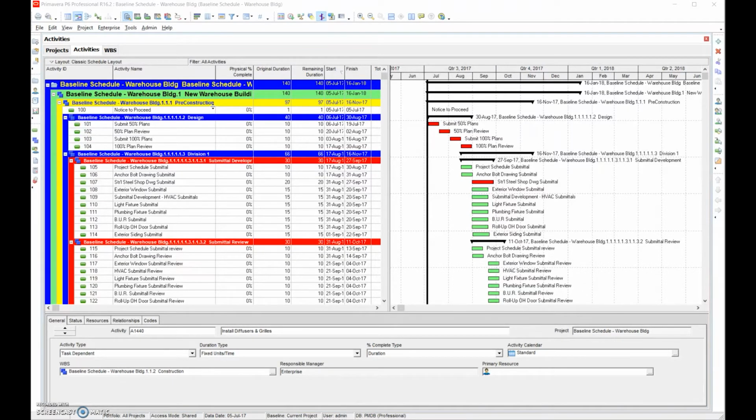So if we have 4 miles and we say it's going to take 40 days to do it, if we can break it down into smaller tasks, at the end of each week, people feel a sense of accomplishment. People want to be successful, so we want to give them the tool. Remember, 80% of the reason projects are unsuccessful is because of management issues, not clearly defining what the goal is supposed to be, and defining it in a proper level of detail. So we want that scope to fit into 2 to 12 days.